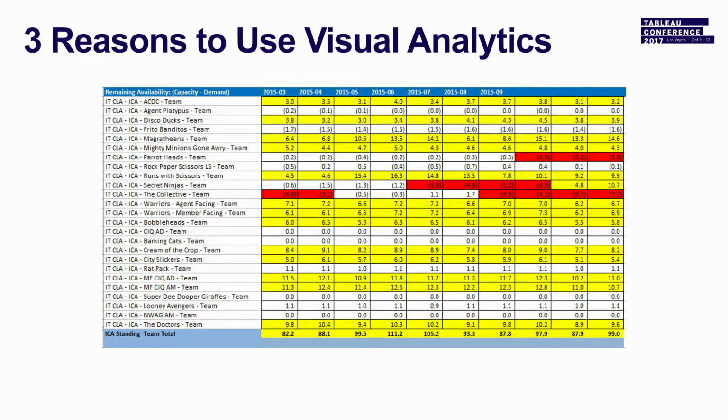So on the left-hand column, we have our agile development lines. In the month columns, we have a number. And again, capacity minus demand. So if you take the allocation hours that you're available minus the allocation hours that you're demanded against, ideally that should be as close to 0 as possible. So the items in yellow show that the team is underbooked and the red are overbooked.